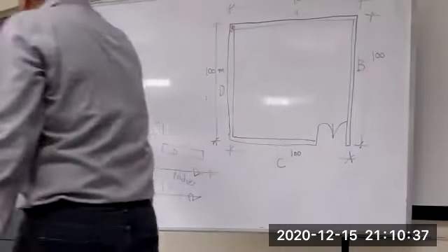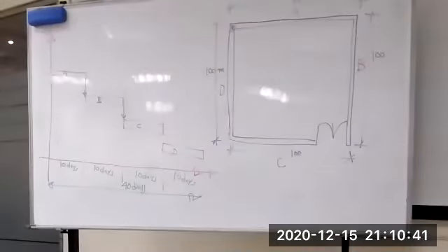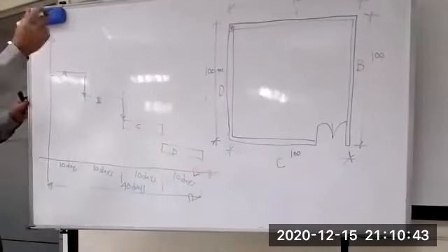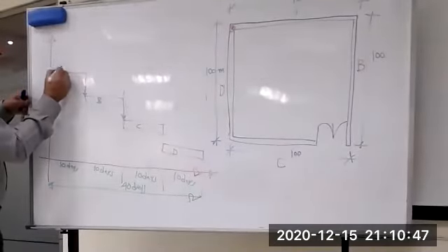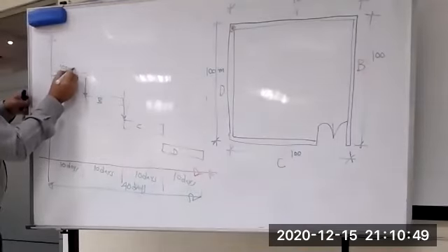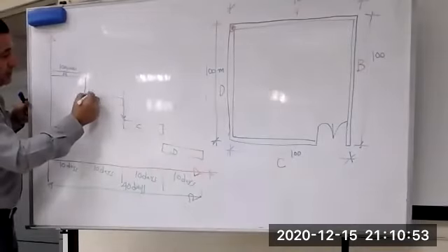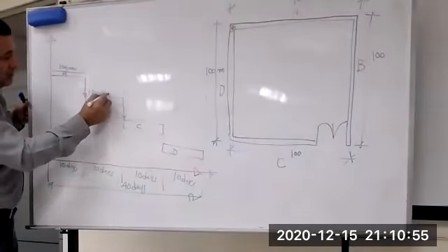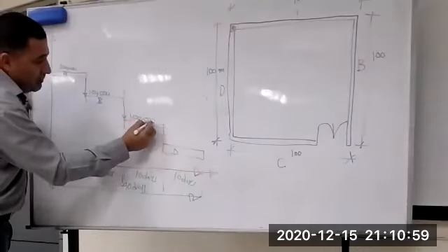Your budget cost for activity A, how much? Budget cost, budget units, everything converted to cost: 1,000 multiply 100, so 100,000. And here all the same.